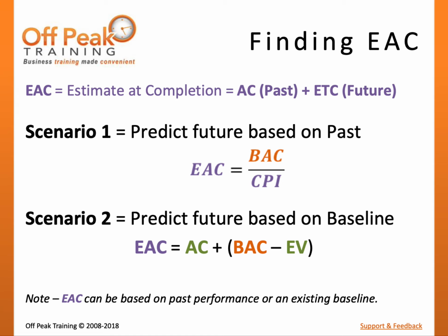While the math is not too challenging, it can be difficult to know which formula to use. Generally, unless you are told otherwise, you will forecast based on past performance using the formula in scenario 1. However, if you are asked to forecast with the assumption that future work will be at plan, then you must use the formula in scenario 2.